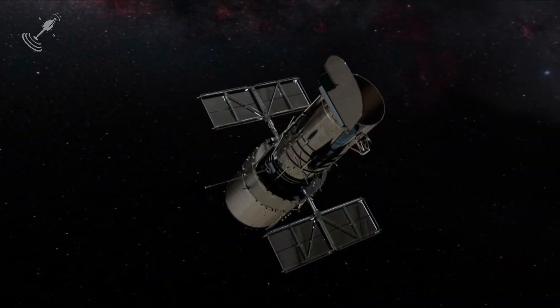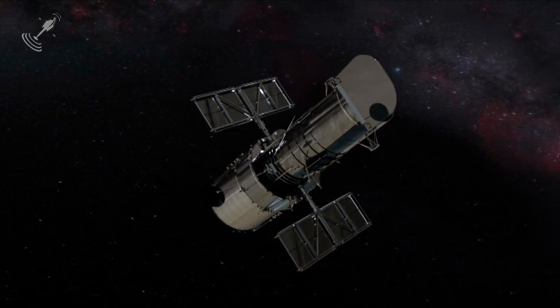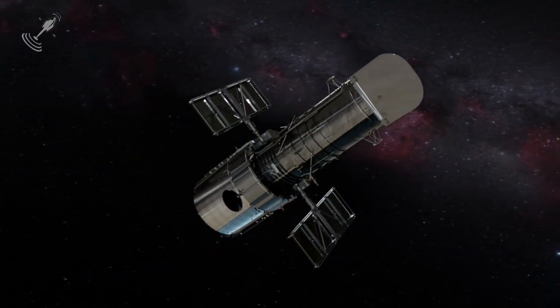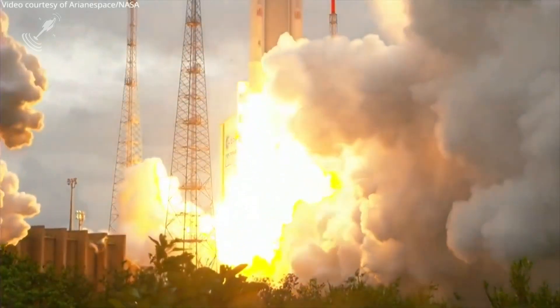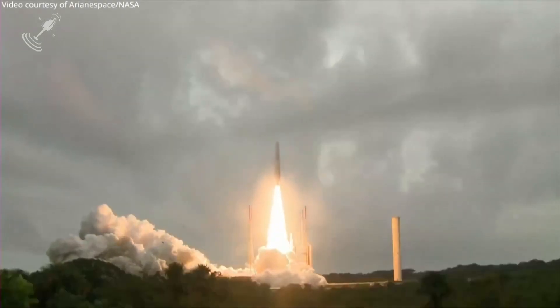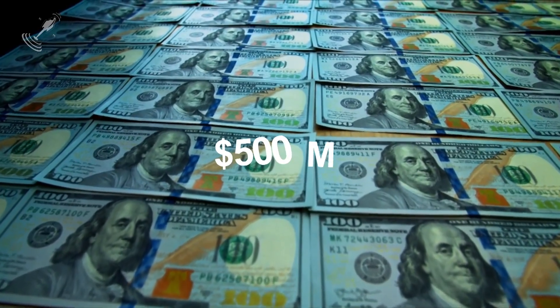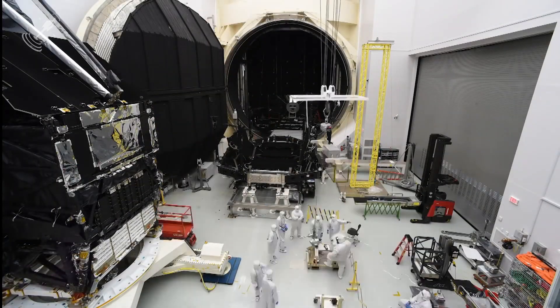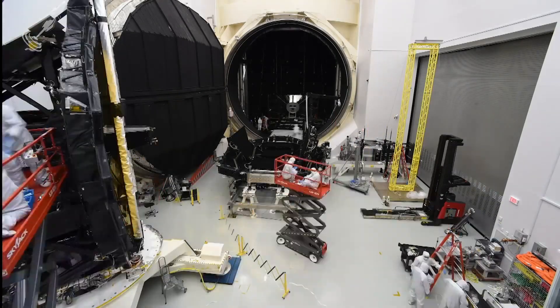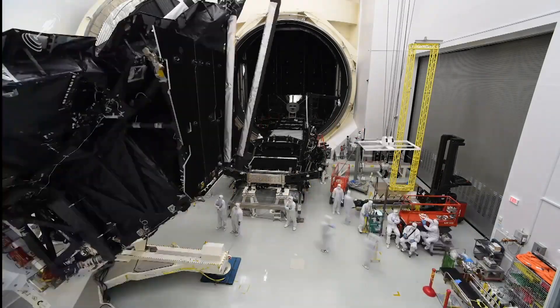Soon after the Hubble Space Telescope became operational, scientists began planning the next telescope. In the early 1990s, the planning began for the launch of the JWST. The initial budget for the project was $500 million at the time. The design and work progressed on the project, and by 2005, a considerable redesign of the telescope had occurred.